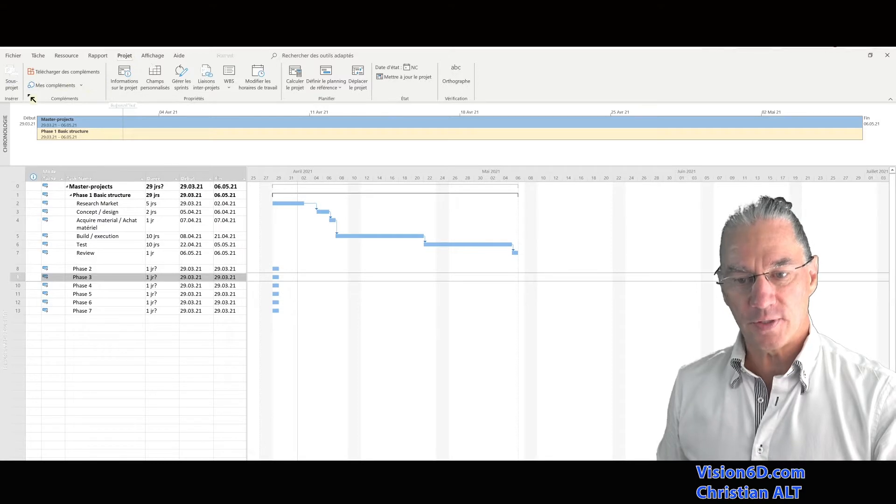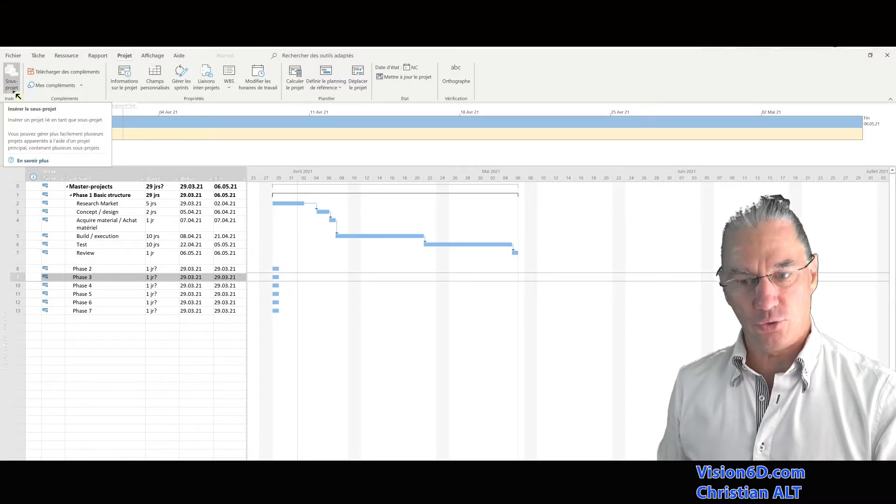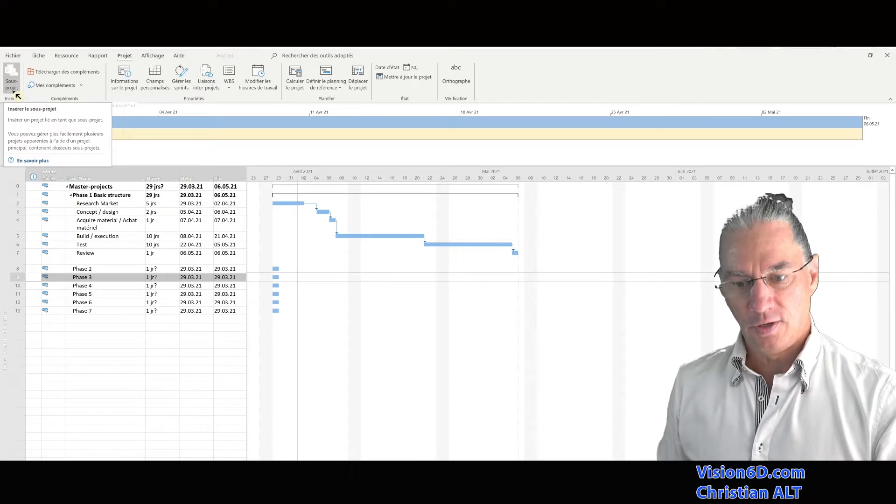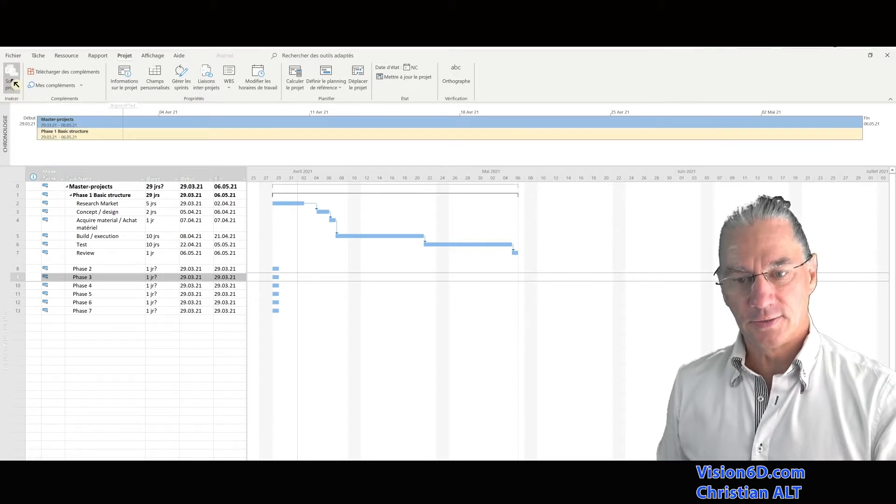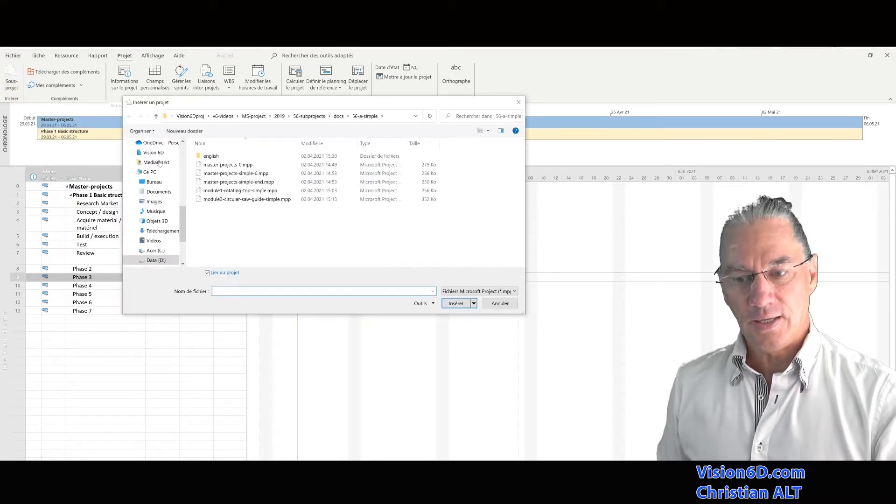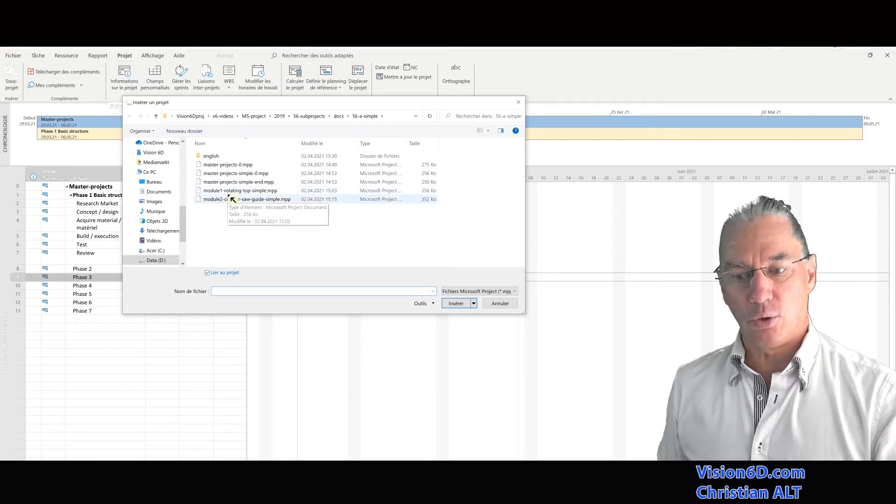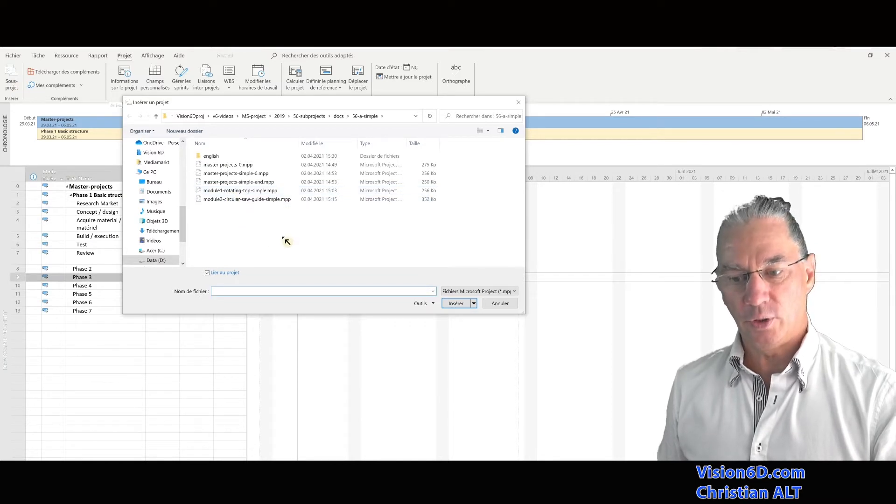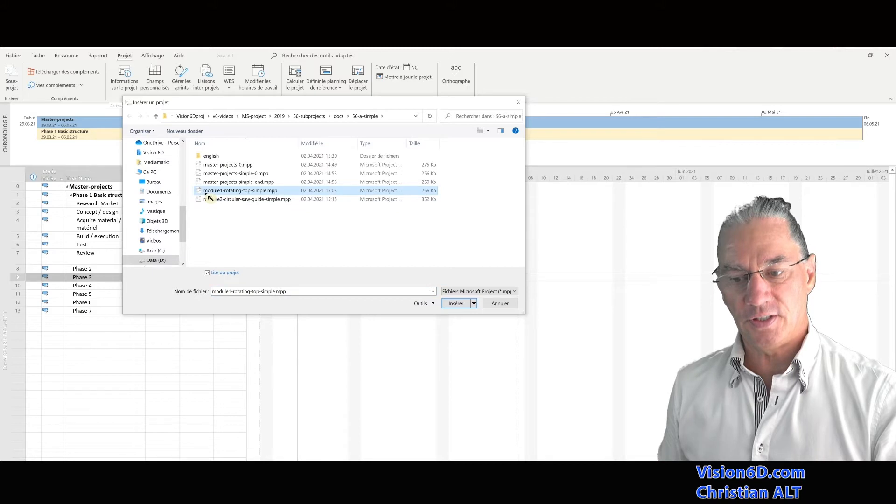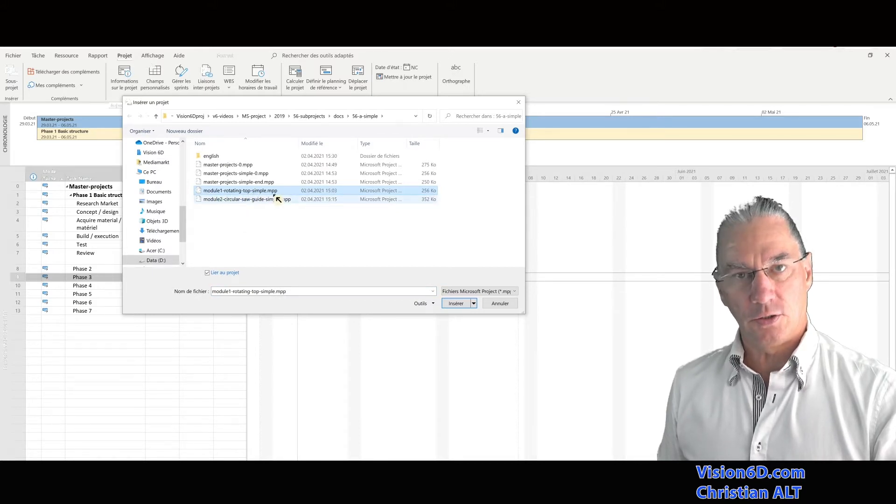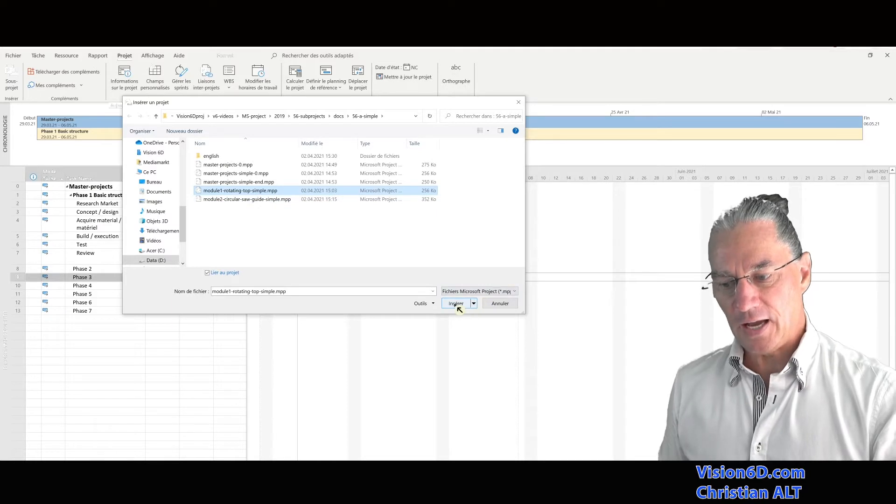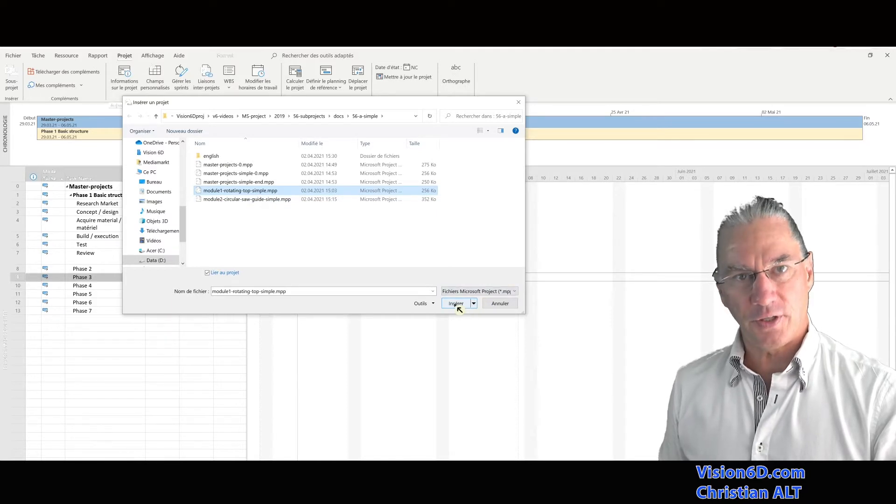And into project, there is a button which allows us to add a sub-project. So I do that and it is opening me the explorer. And with the explorer, I can find here my file, module one rotating top, and I can insert it.